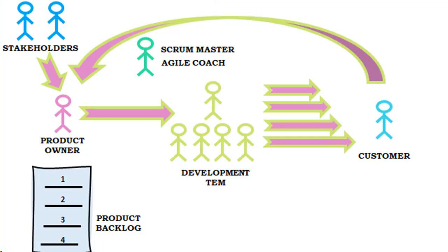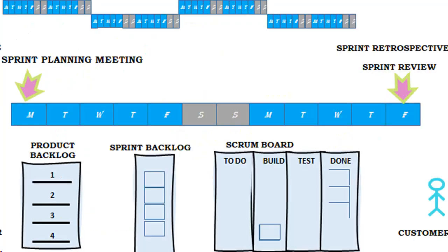In an incremental life cycle, the deliverable is produced through a series of iterations that successively add functionality within a predetermined timeframe. Adaptive life cycles are agile, iterative, or incremental. The detailed scope is defined and approved before the start of an iteration. Adaptive life cycles are also referred to as agile or change-driven life cycles. In a hybrid life cycle, requirements will be elaborated at periodic intervals during delivery.